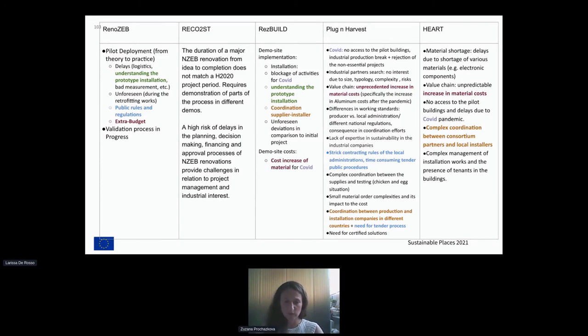We have been in contact with 9 different producers, of which only 3 actually agreed to collaborate with us and gave us a proposal for the manufacturing of the plug and harvest kits or plug and harvest facade modules. And here we come also to the extra budget